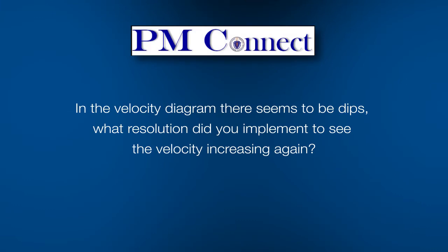Yeah. Usually when velocity flattens off, you are in some kind of technical debt. You have not been doing your homework in automated testing, continuous integration, etc. Sooner or later, you can't just speed up the team more. You must also have a look at the technology you're using. And automated testing and continuous integration are definitely tools you need to use.